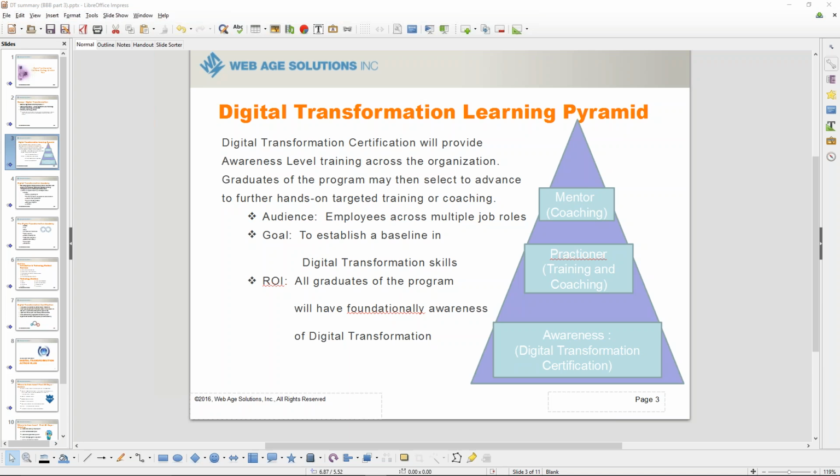If you're doing an Agile technical team, what you really want is a couple, 3, 4 people to come into a team of 10, pair in, and get the team working. Getting the team working, it's pretty quick that that group can leave and be replaced with just team members and then move on to help a different group. But having the team members come in, pair in, and partner is a big deal.